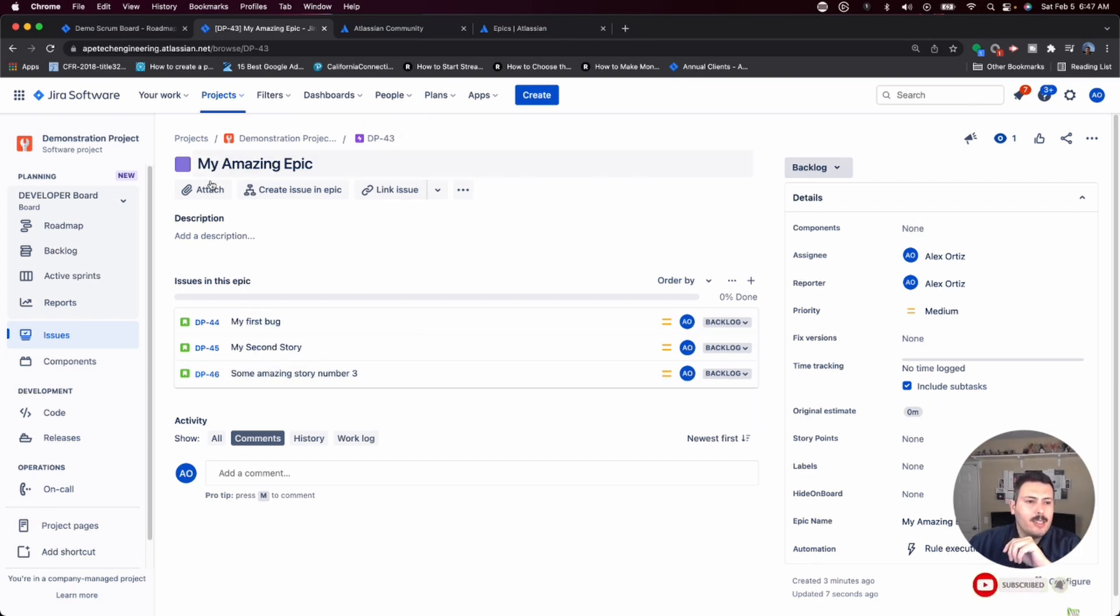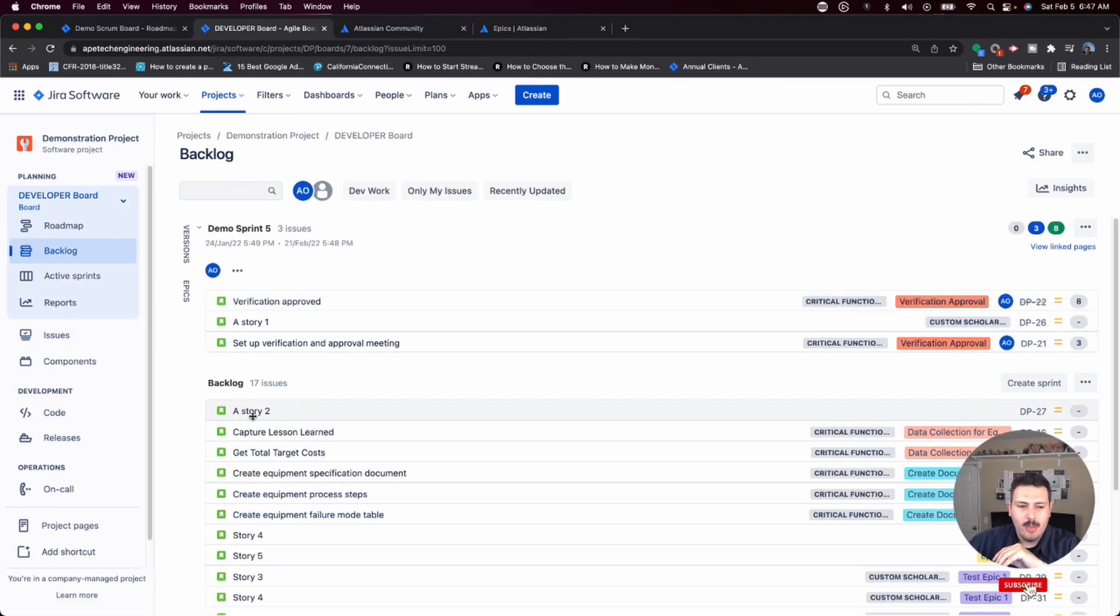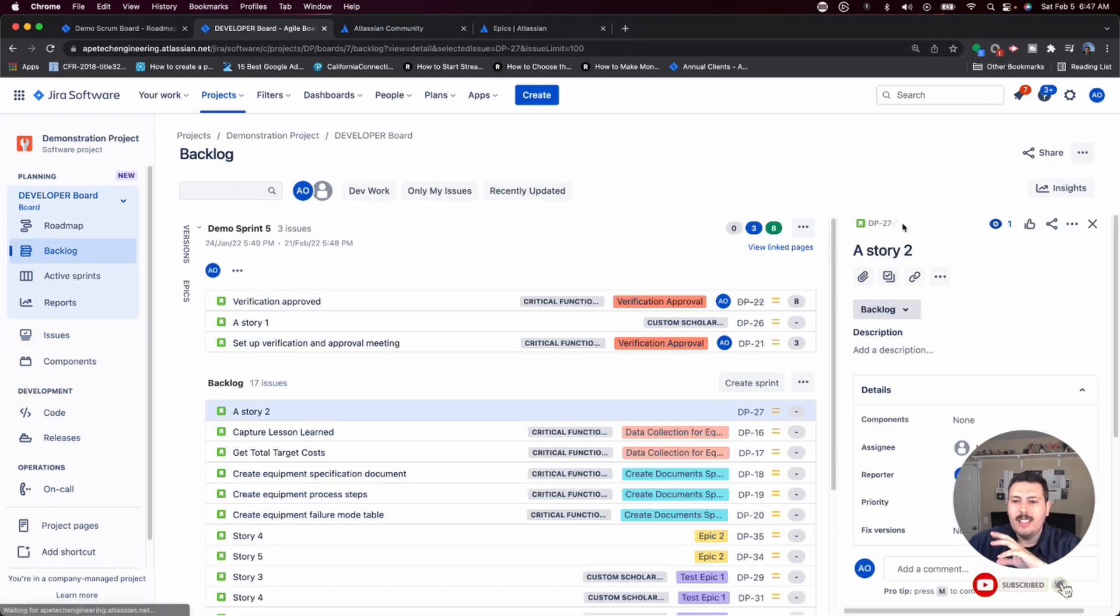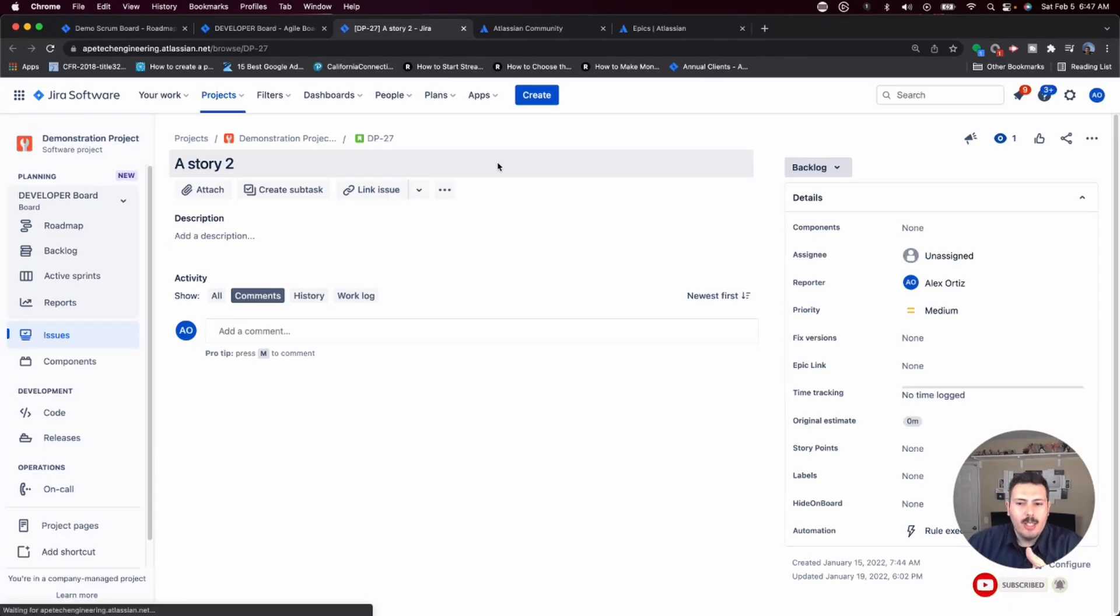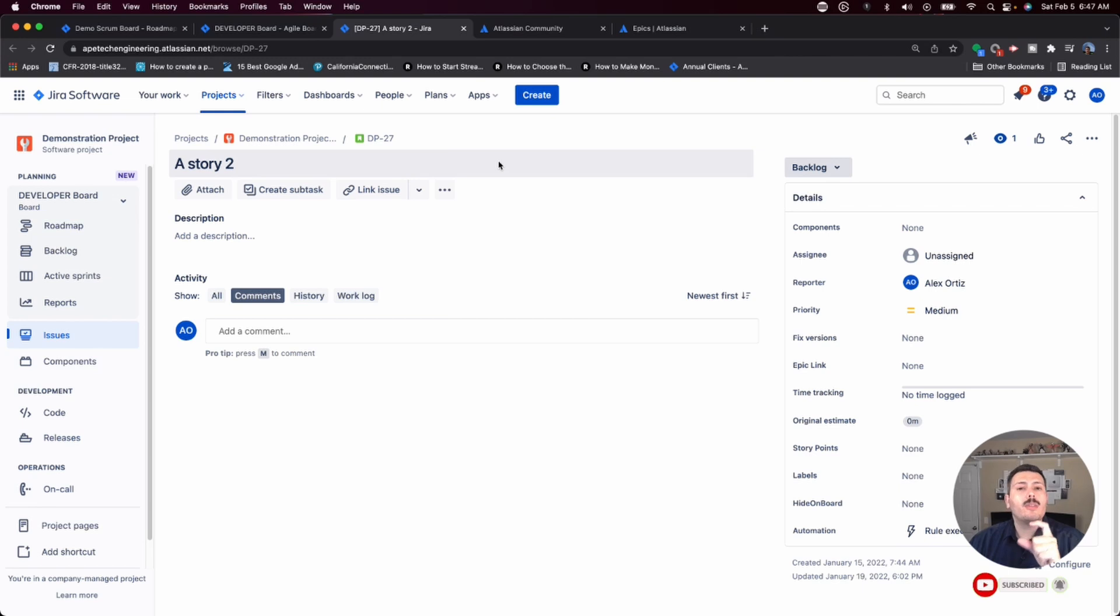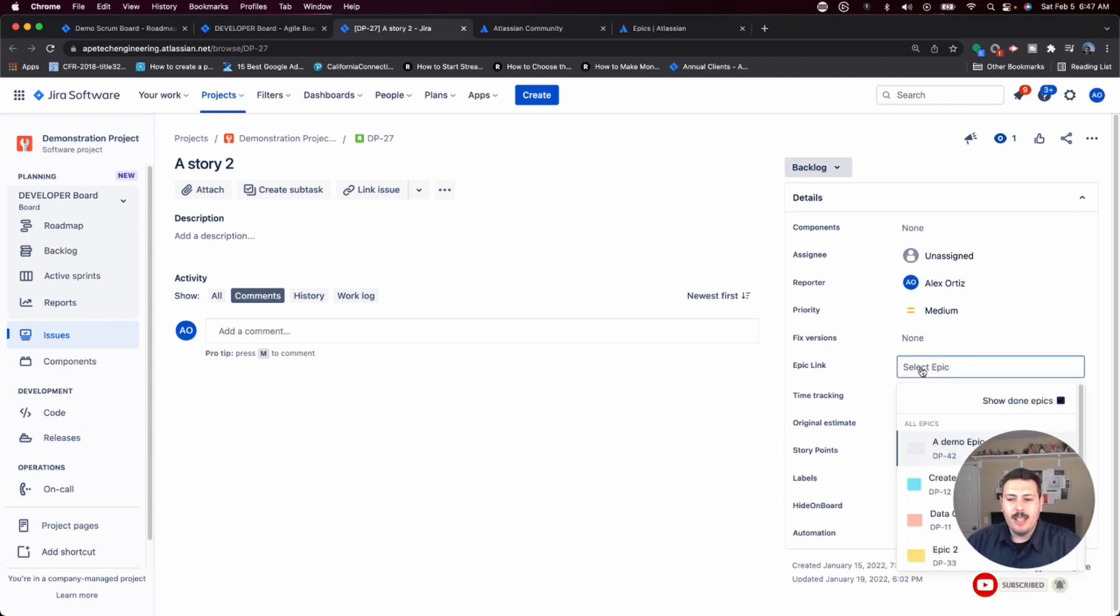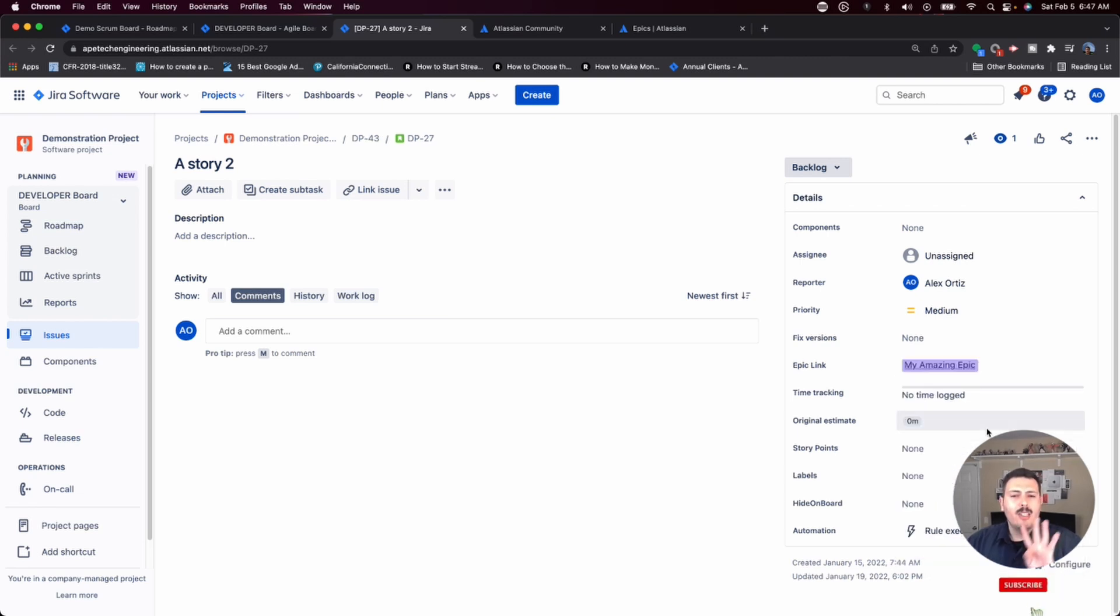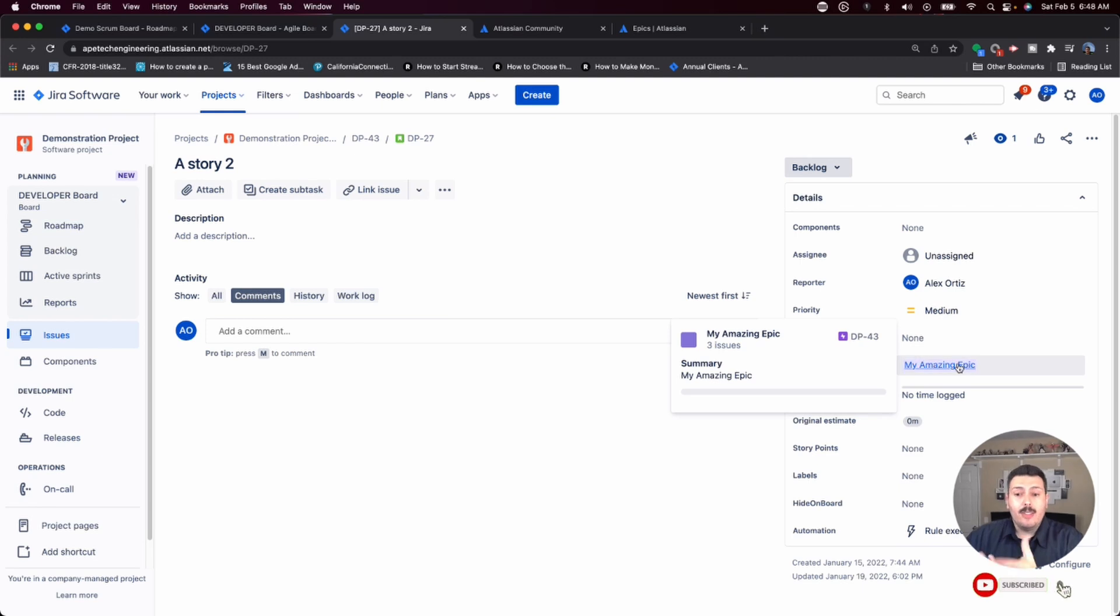The other way is if you have just a random story, I'm just going to open this one here. Story number two, it doesn't have any epics associated to it. And at this point, you're probably wondering, how do I know if a story is associated to an epic? There's three ways really of finding out. So let me walk you through those. So one, there's an epic link field that you're going to be able to fill out. So if you click on this epic link, you're going to then be able to find whatever epic you want and tie it to it. So I'm going to tie it back to the DP-43. So I should have four stories in it. Once I do that, so if you're coming into a story, you look for the epic link. If there's a value in there, that's your epic.